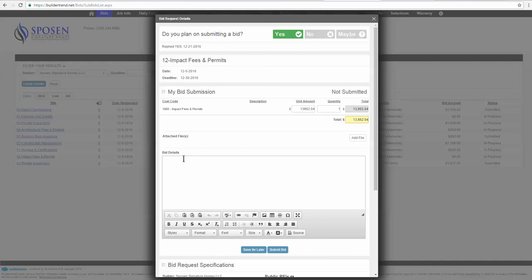If you find there's a line item that is not included in the job, you leave it blank. If it says you want to bid on crown work, and the basic standard features of this house do not include crown, well, then you just leave it at zero because it's not included. If you want to clarify anything about your bid, you can clarify things here.